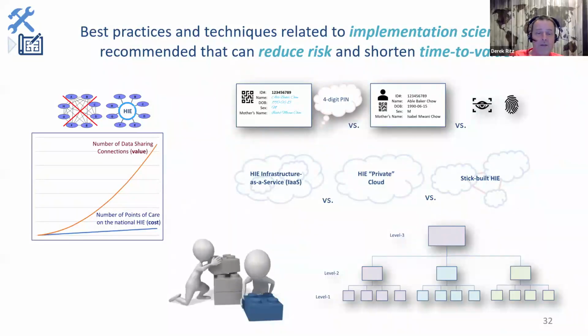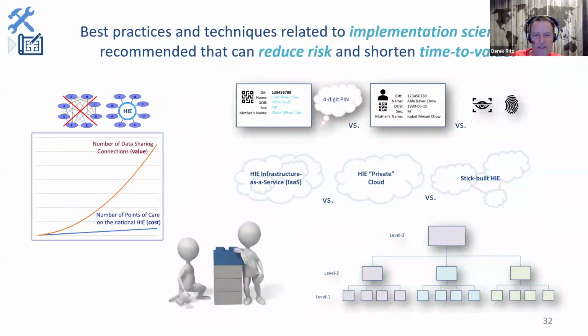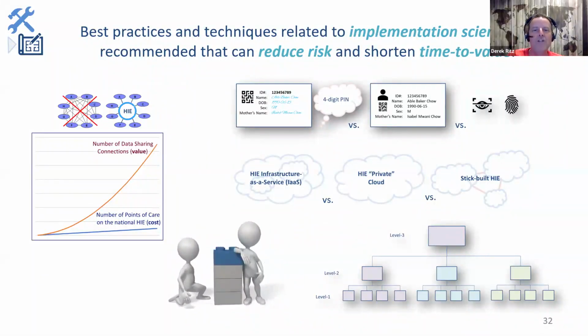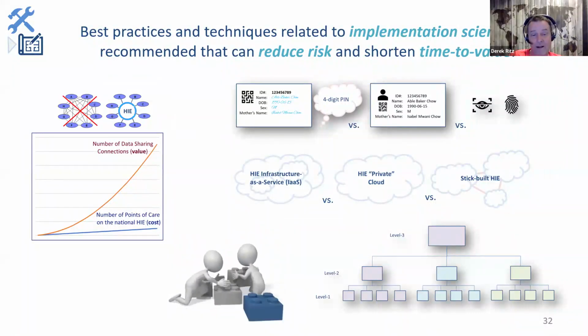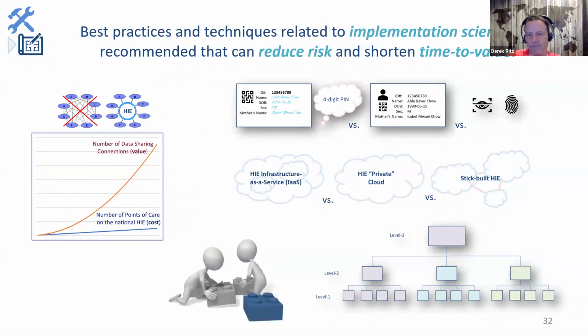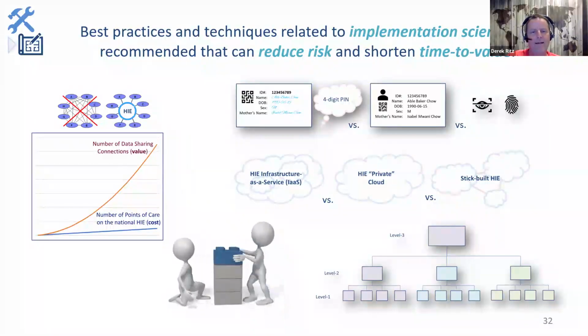That was the case in the UK. I remember people talking about what a big debacle that UK investment was because they put in place the spine, but the edge of the network wasn't ready. So the fact you had the middle in place didn't matter. And a lot of people walked the plank on that project in the UK. It was career ending for some people. And how unfair is that?